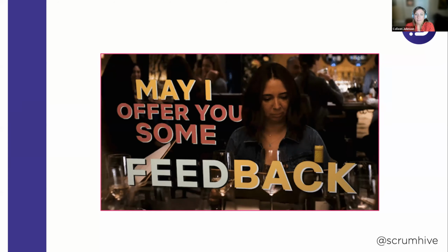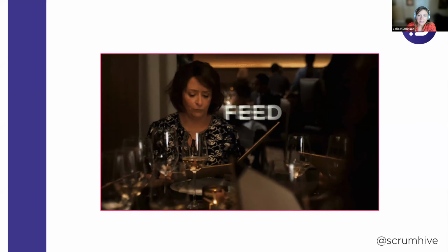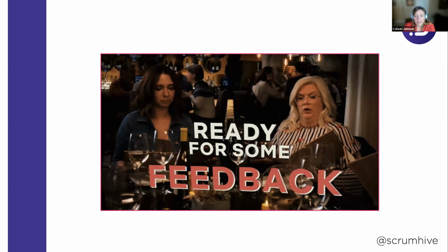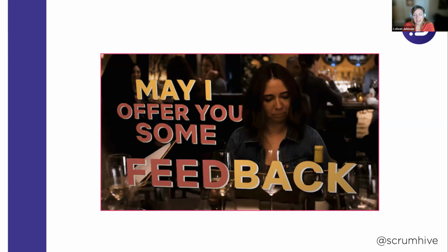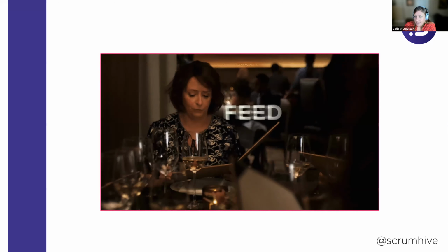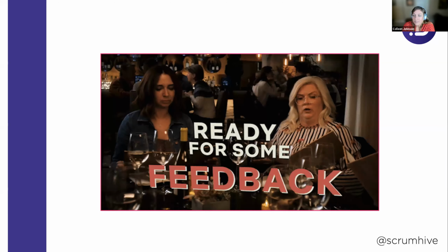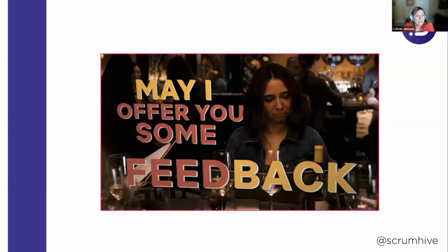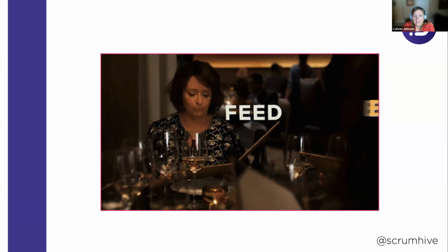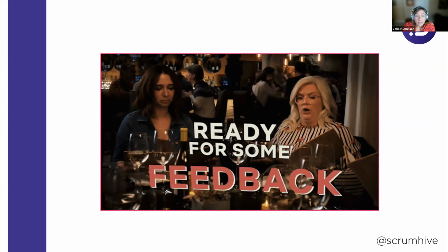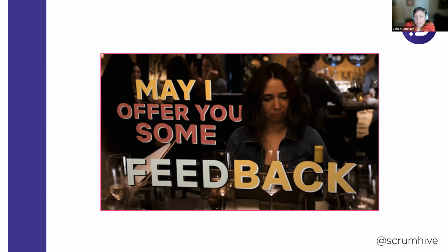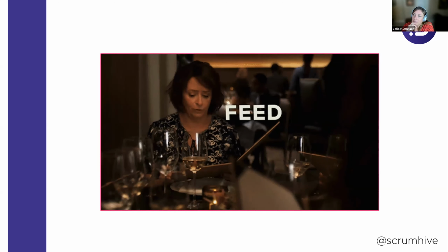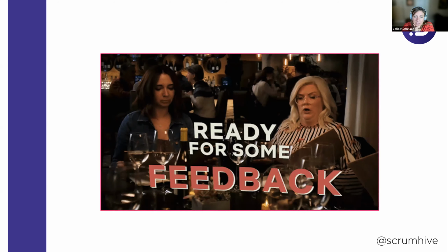So for this particular client where this happened, we started doing what we call a retro recap. At the end of every sprint, all the scrum masters get together and they talk about the themes. And we try to be really careful to not disclose anything about who said what, or in some cases we try to just keep it very theme based, right? We're not breaking the trust or the safety of the team.